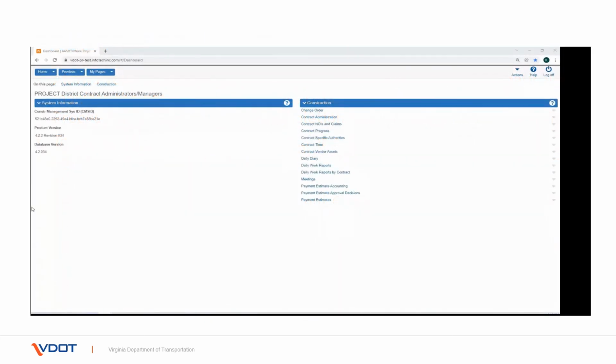In this video we will walk you through the process of creating a contract progress schedule. It enables you to create a schedule by which the system can automatically monitor the progress of a contract based on the agency's notice to proceed date and the actual completion date recorded in contract time. Depending on the type of schedule selected, you can track the % of work complete for designated time periods, the % of critical items completed for designated time periods, or % of work complete only on the final day or date.